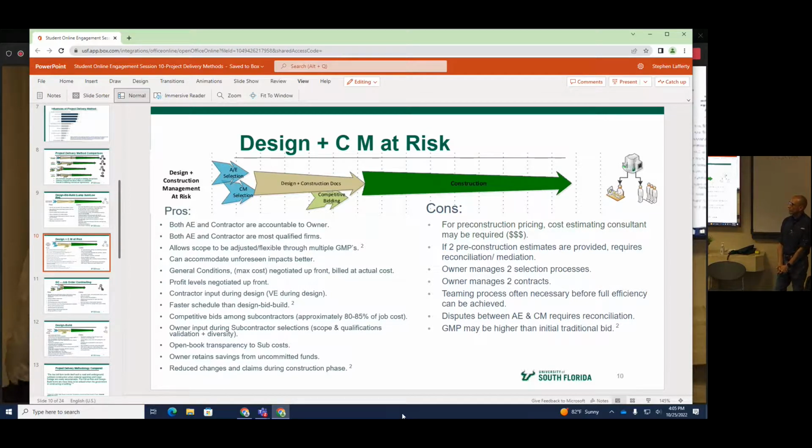If you're doing a low bid project or a competitive bid project, that communication has got to be very, very explicit, because you've got 10 different contractors looking at it. And if two contractors look at it a different way, they're going to end up bidding it differently. Whereas here, in a construction management, again, you've got meeting minutes, you've got everybody on the same page. There may not have to be as many drawings, as much specificity, and that all turns up to dollars. So you may not have to spend as much on the architect and engineering doing a super duper complete set of drawings for a competitive bid project, as opposed to a good set of drawings for a construction management contract, or at least the subcontractors can do it. And then some of the gaps can be filled in by meetings or communications.